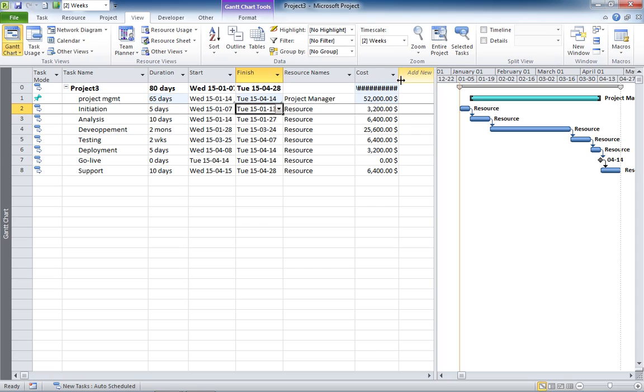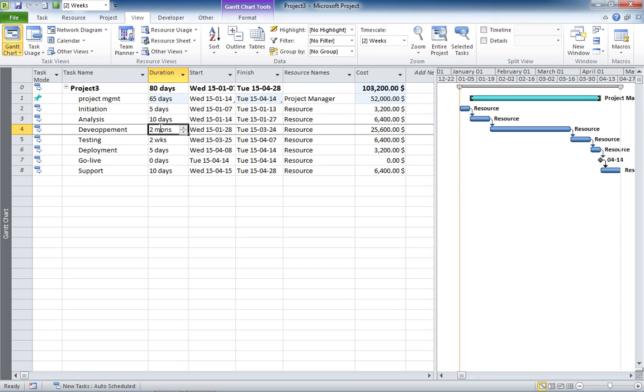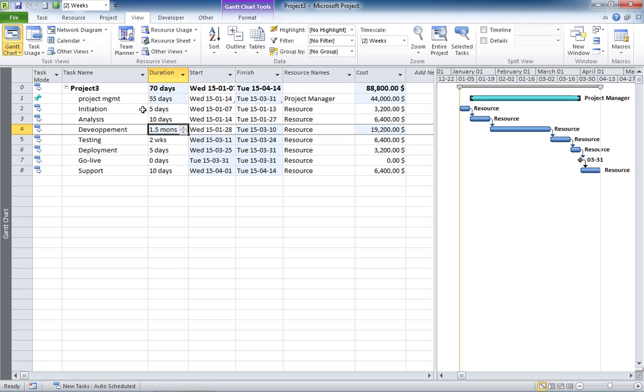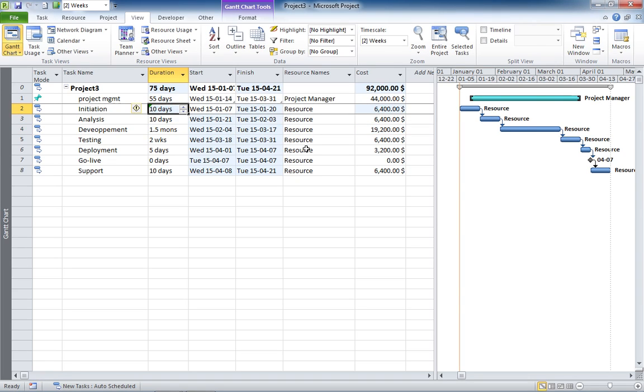You get a project manager hammock task that is created and that will follow your schedule. Now, if I reduce the development time to 1.5 months, you see that the task is following. If I increase the initiation 10 days, everything is followed again.